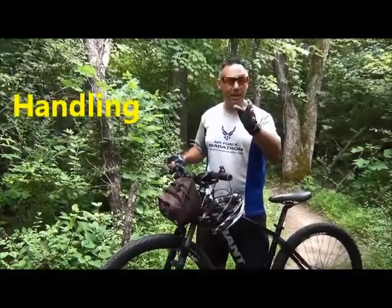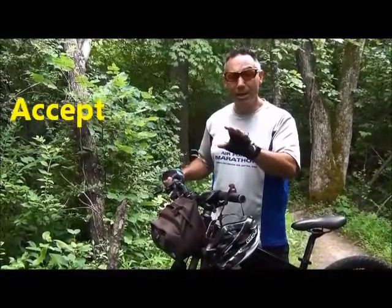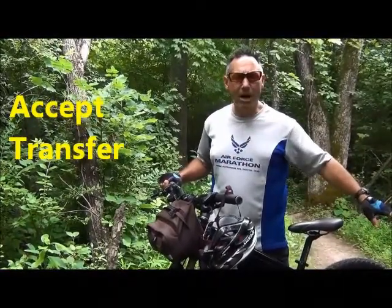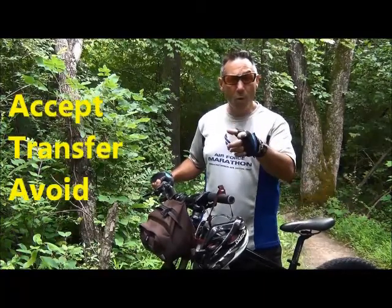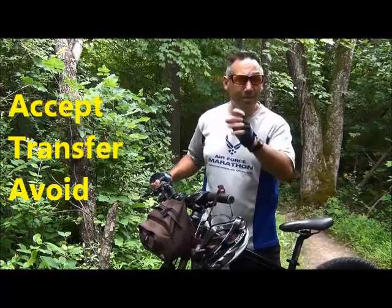I have 4 choices. I can just accept it, which I did in this case, and unfortunately, it was only because I didn't plan very well. I can transfer it. Maybe I can have someone drive behind me so that if I do get a flat, they can pick me up and take me back. Also, probably not a really good strategy. The third one, avoid: I could just drive around in circles. That's no fun. I'm going to significantly impact my operations that way.